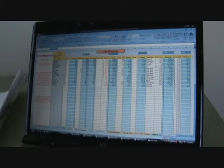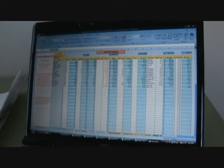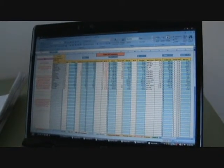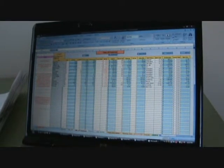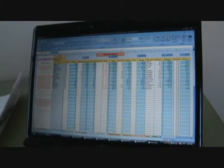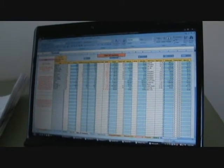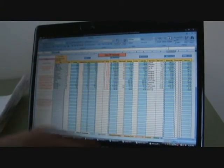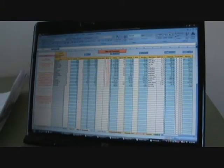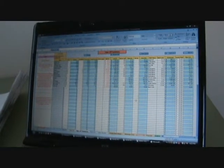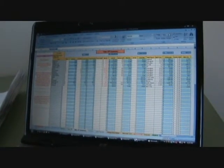But walls three coats, walls two coats, ceilings, exposed ceilings, the different surfaces that you're going to put a price on, and then you apply your price, you'll have your total. This could be your total bid, then you break out your labor materials on this side. So you can do a labor burden sheet.